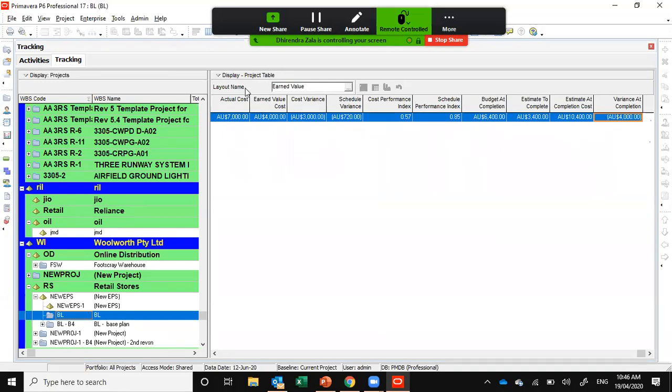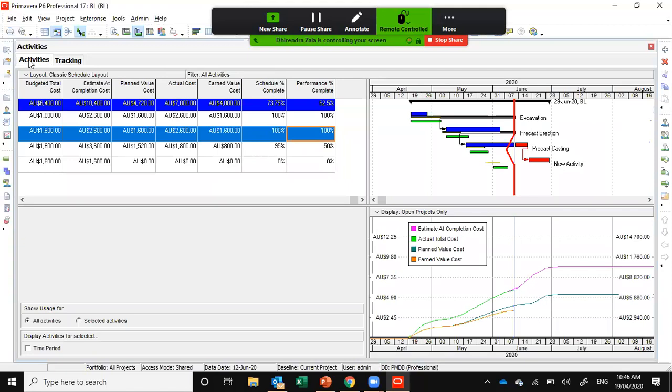In that situation we are revising the project, and that's why we need to create a new baseline once you revise the project. Whatever action we take in a revision, there are only two things: you can increase the time or you can increase the resources. There is nothing behind the logic. If you are getting delay, you just have to increase the duration. If your resource is not feasible to make that much performance, whatever amount you have spent in a project is already lost. So whatever revision you take, you have to initiate with new resources and new duration. That's the only forward path.